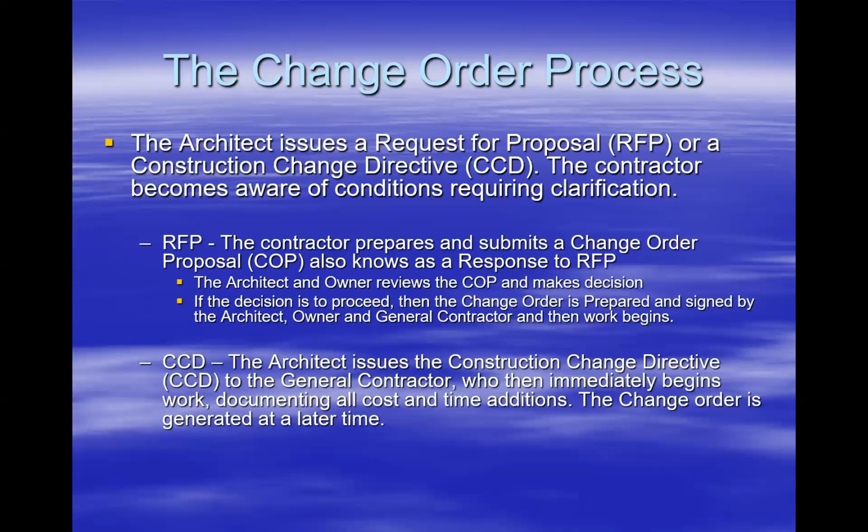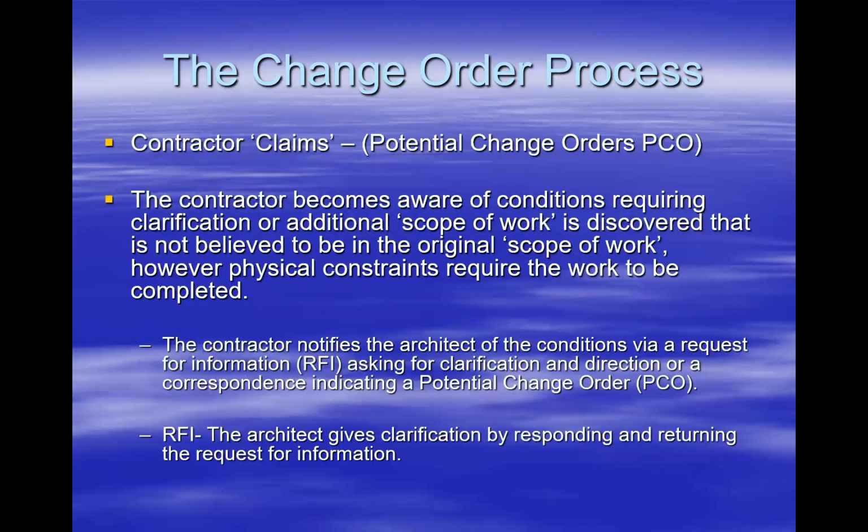And let me be careful here. You don't have to necessarily make the claim. You need to put the architect and the owner on notice that there will be a claim. You don't necessarily have to finalize the dollar amount, but you need to let them know that you will have a claim. Now, if you guys go back to when we did our tracking logs, I introduced you to the idea of a potential change order, and we logged those.